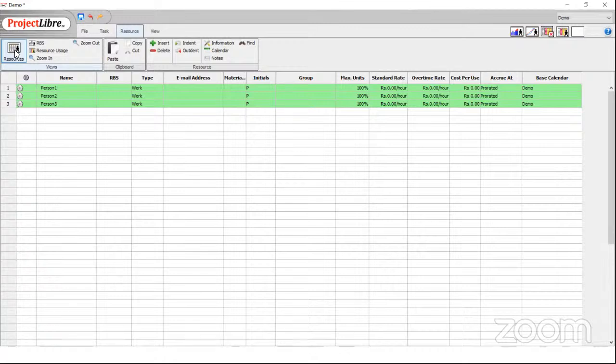Okay. So Vaibhav is having difficulty, saying people are not appearing on the resources column of the Gantt chart. It doesn't. I think he typed it. Ravi typed it. You have to type it there. And you have to make sure whatever you entered in the resource sheet, you put the same names. If necessary, go back there, refer to it, or copy paste it.